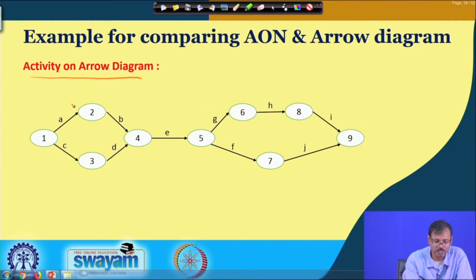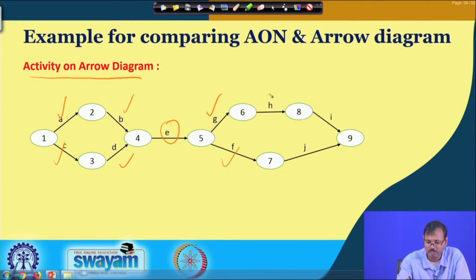Actually the durations are not given, you can add the duration at this position. So, these are the first jobs, drilling, then charging, then the blasting will be carried out only after completion of this one. Then this one is for overburden. So, you have to carry out mucking, then secondary drilling, blasting, then face preparation. So, this is a very easy way to represent this.